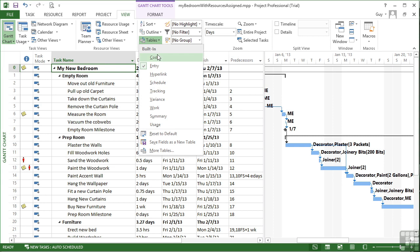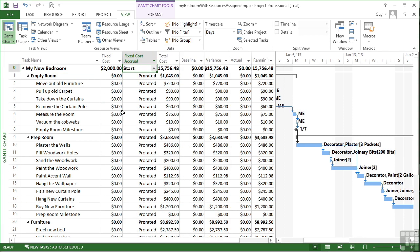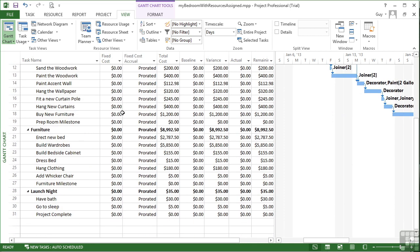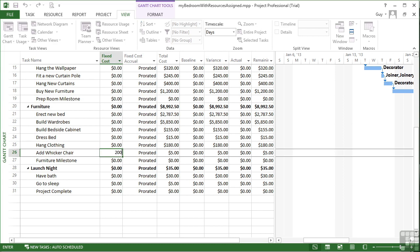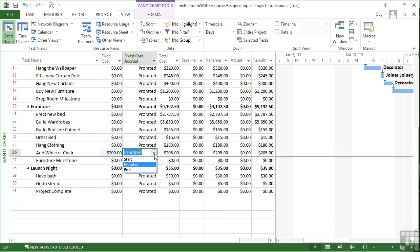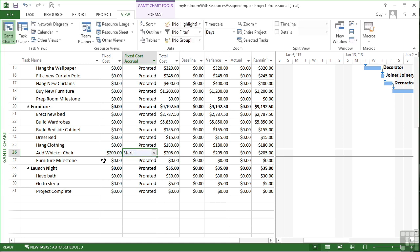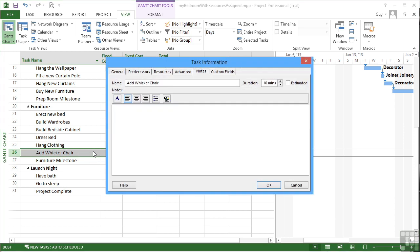And you can add a fixed cost to any of your tasks simply by changing the table to the cost table. And it may be that you have a fixed cost for adding the wicker chair. $200 fixed cost. We have to decide how that's calculated. That's going to be at the start of the task. But because there's no label to explain that, we need to go into the section to add a note.